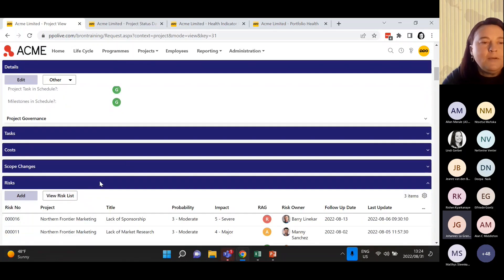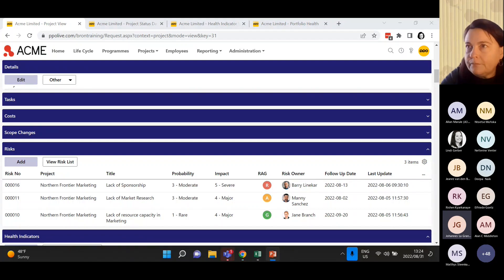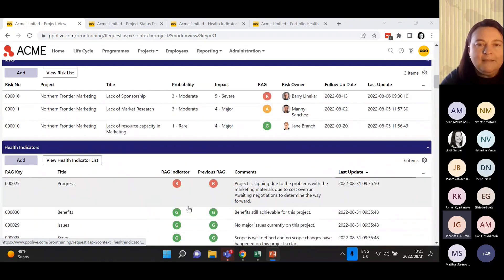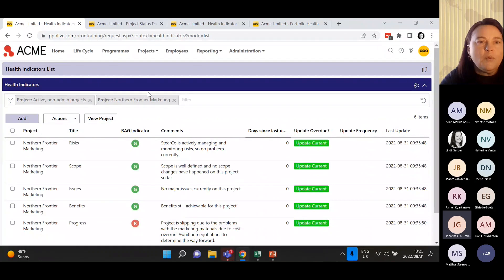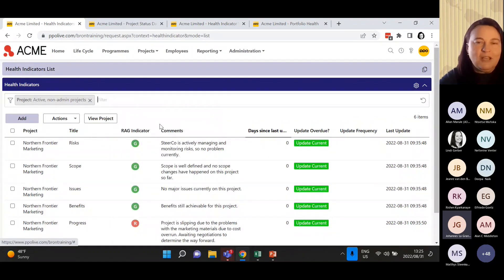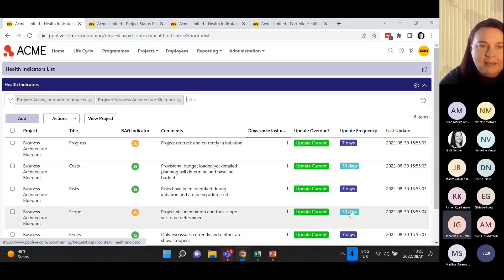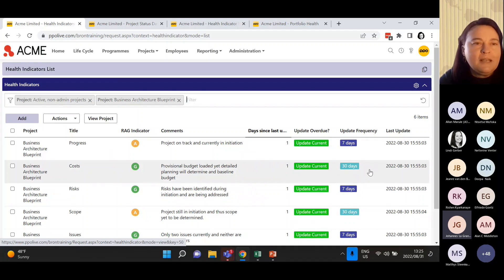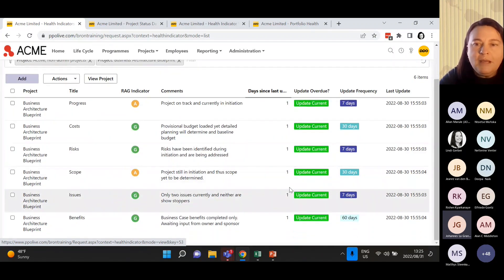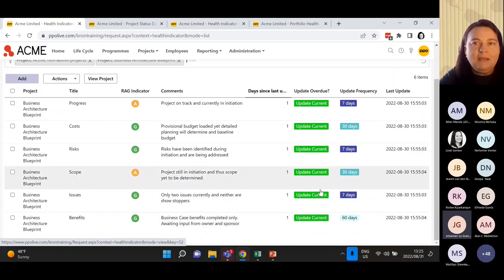We can take this even a step further. Per health indicator, you can have different frequencies depending on what the health indicator is. For example, something like progress, you want updated every seven days. However, something like costs - you might only update every 30 days because your financials only come through every 30 days. Scope might be 30 days, and benefits you might only relook at every 60 days. You can actually go and set that update frequency per indicator.